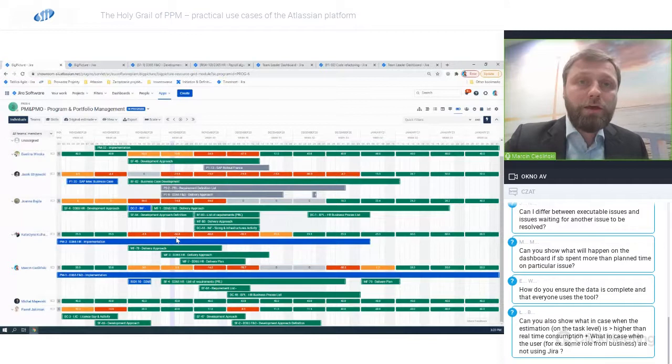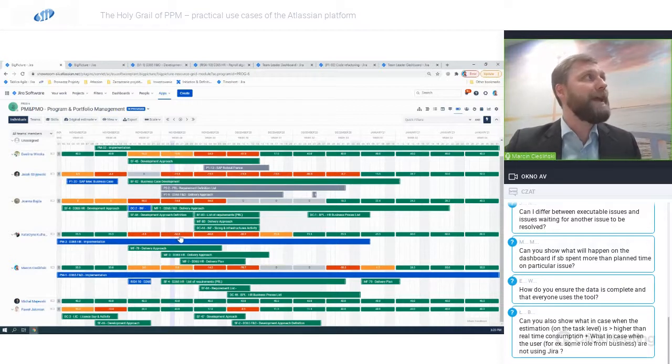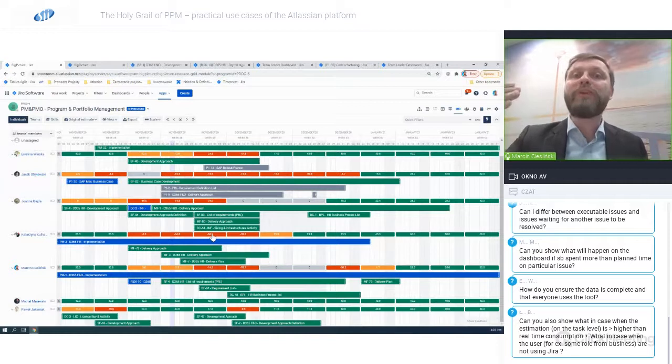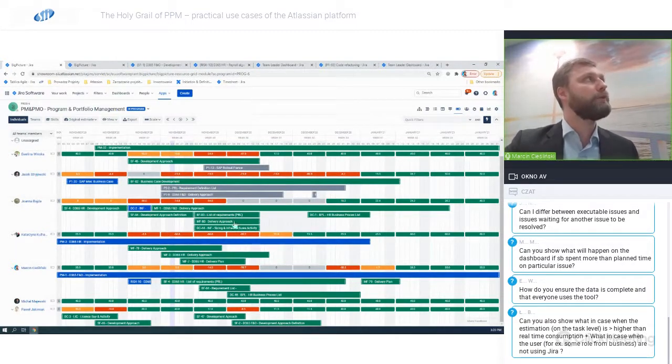And probably if the number is extremely big, like in case of Katarzyna, we have a 34.8 or 66.8 of over allocation, that means we really need to change something, because effectively Katarzyna should be working 2 jobs, right? 2 FTEs. She's doing 2 FTEs of work in the 3 weeks, week 48, 49, and 50. And this is not what we want, right?